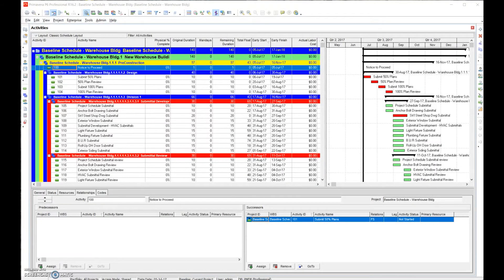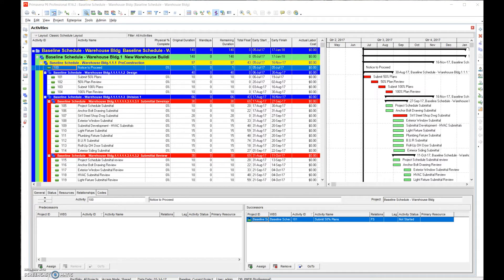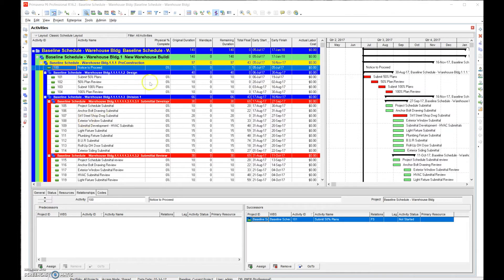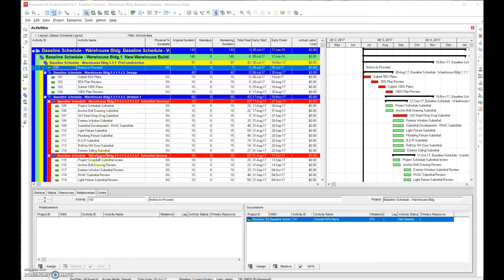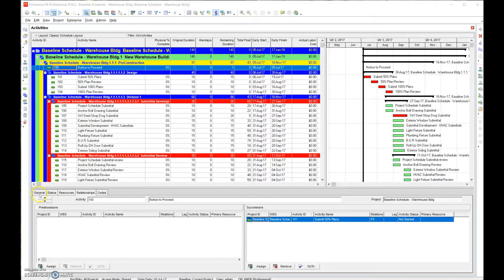Step nine: assigning task calendars. Now that we have the schedule put together with logic and durations, our next step is to assign availability to each of these individual tasks. What I mean by that is assigning a calendar of availability to every single task we have in the schedule.